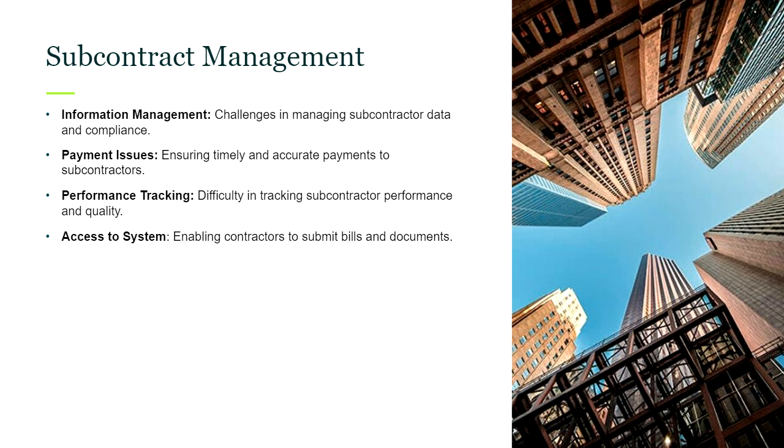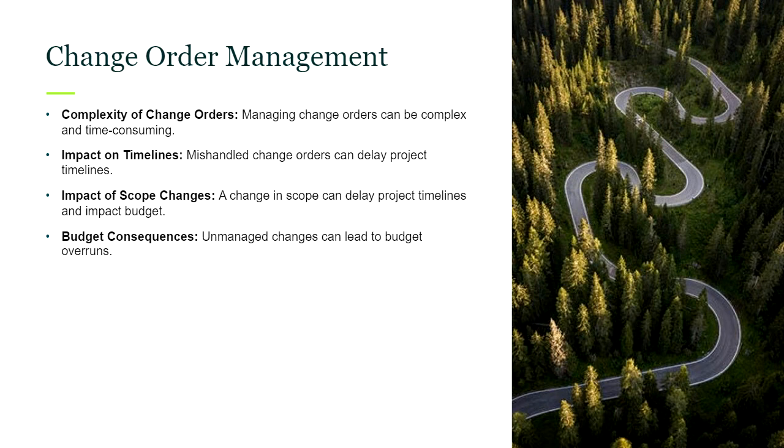Moving on, change order management. This is another area, specific in construction, where managing those change orders can be complex. It can be time consuming, and we need software to enhance our overall productivity in this area. When we don't handle change orders appropriately, there's an impact on timelines. Oftentimes, those scope changes don't get relayed to the necessary team members, thus delaying project timelines and impacting budget.